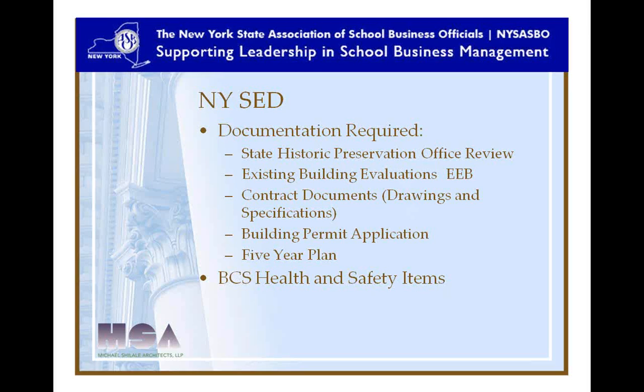Sometimes we can have those items or the EEB items, whether it's some extra exit lights or maybe the glass in some doors are not laminated. You can have your district personnel do that work and not have it as part of your construction project. If you're just doing a roof project, usually you don't want your roofers coming into your building, adding some exit lights or replacing some glass and doors and things like that. So rather than put it into the construction project, you can tell SED that you're going to do it with your own forces, but they want to make sure that that work gets done certainly before they'll issue a certificate of occupancy on the project.